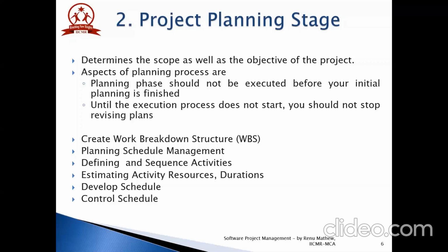Estimation of activity duration is followed by Develop Schedule. Develop Schedule is the process of analyzing activity sequences, resource requirements, duration, and schedule constraints to create the project schedule model. For scheduling each task, 3 main factors are taken into consideration: duration, task dependencies, and constraints.